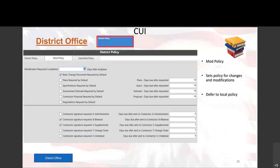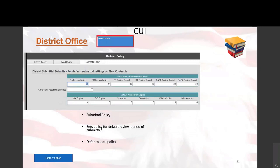This is the mod policies screen. You can set how many days proposals are due after being requested, require certain checkboxes, and require certain signatures on certain parts — all depending on your district's policy. Setting this at the district level applies it to every contract in your district, so the consequences of changing this data are widespread. Similarly, the submittal policies screen lets you set review policies on certain types of submittals — FIO, GA, and so on — including number of copies and default review days.